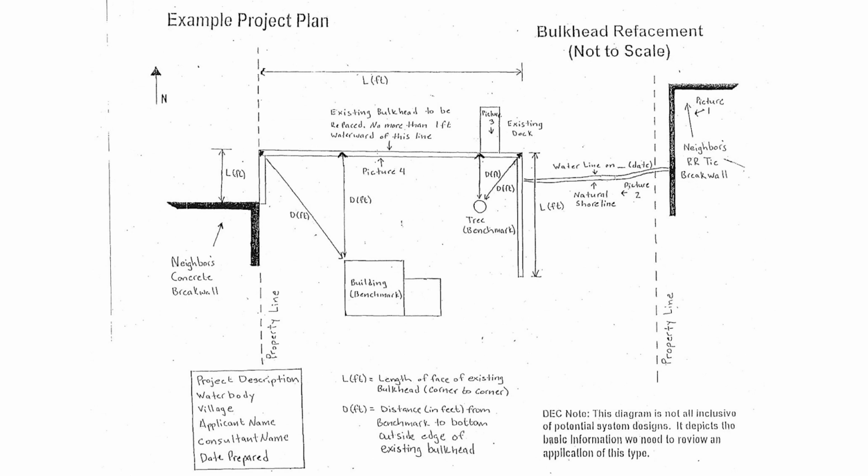This sample plan and the following cross-section illustrate a repair of an existing break wall. Note that the general permit allows the repair of vertical structures like break walls. Extending these structures or installing new ones is not allowed by a general permit. Like the revetment plan, the dimensions of the work area and all construction materials must be identified.